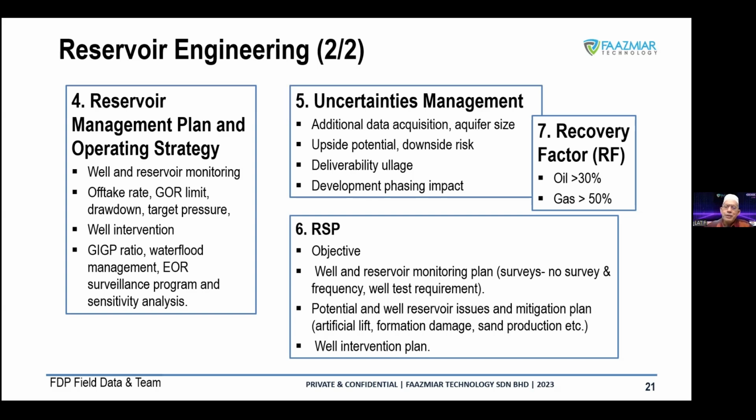So in general, number 7, recovery factor is just a guideline, because the oil recovery factor depends on the number of wells. For example, you have one field. If you have 3 wells in the field, of course, the recovery factor will be very low. But let's say you have 6 wells in that field, of course, you're going to get a higher recovery factor. But what happens actually, the more wells we drill, the more expensive the project cost will be.